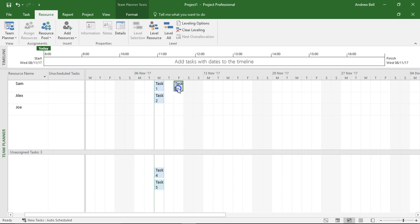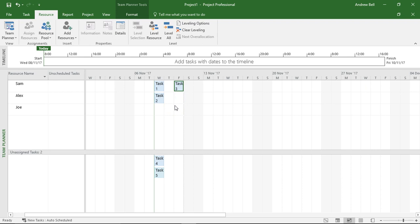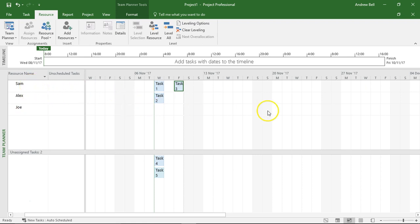But an important thing I can't do here is I can't actually get Sam and Alex working on task 3. So I think this is a bit of a drawback from the Team Planner, but it does give me a clear view on my resources and what they're doing and when.